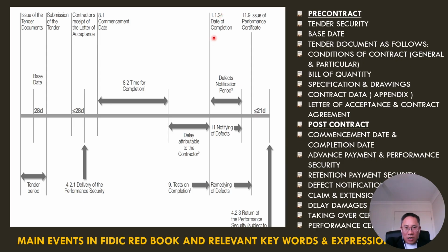And on that day, the day the contractor hands over the project, the employer will issue the taking over certificate to confirm that on that day the contractor has handed over to the employer for occupying.